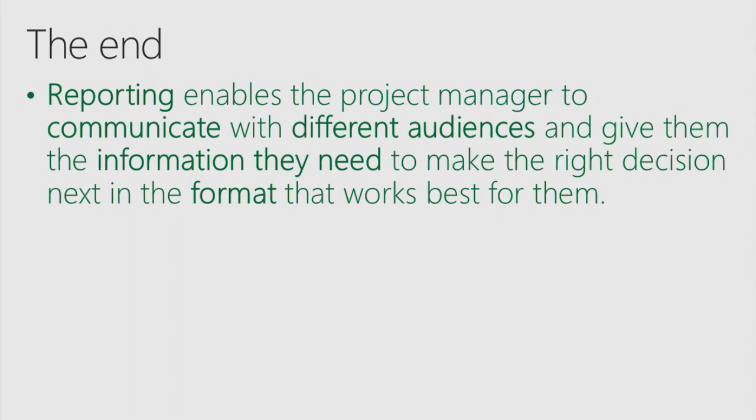However, how you report in Project Server is often different, and typically, as well as creating this sort of report, or instead of, you might create a SQL Server Reporting Services report or an Excel Services report. And of course, you've then got the question of how do I group projects in Project Server? Do I use this master project and sub-project environment, which I personally don't like, or do I use some other way of enabling a program project with those inserted work streams? So it'll work, but you would explore other options in a Project Server environment.